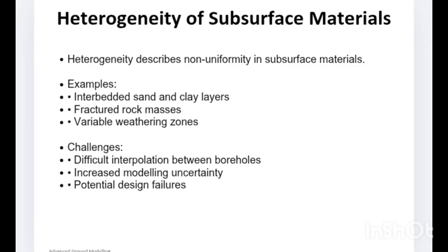We have challenges, yes. There are challenges created by heterogeneity. And what are these challenges? Difficulty in predicting subsurface conditions. Increased uncertainty between boreholes. So you can have a borehole and another one there, and you're not even having the same log. More complex engineering analysis, right? And higher risk of unexpected conditions during construction.